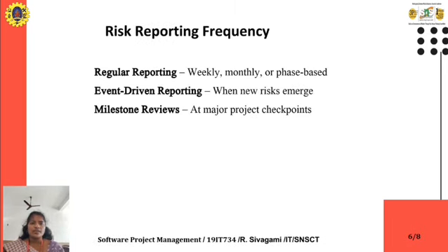Risk reporting frequencies: regular reporting, event-driven reporting, and milestone reviews. Regular reporting means we should monitor our project weekly, monthly, or phase based. If any risk occurs, we monitor and report weekly, monthly, or phase based.